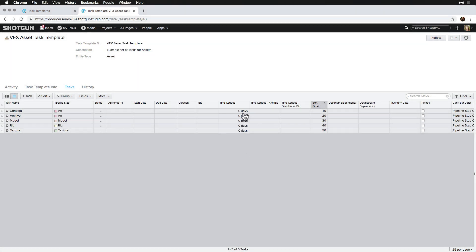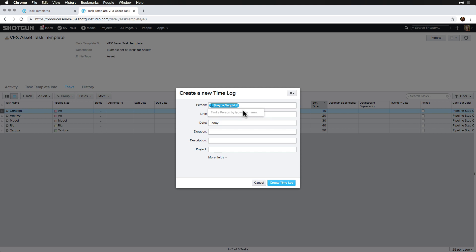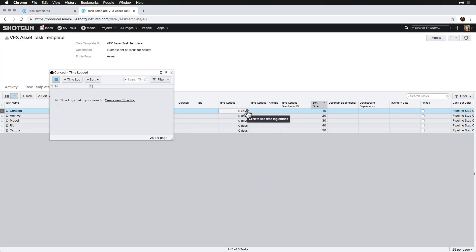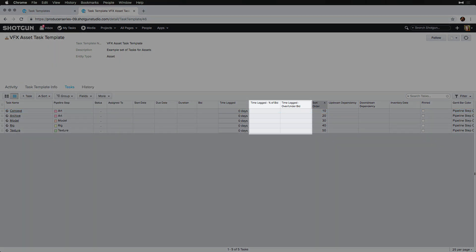Time logged will show me a sum of the time logged against that task, and it will also allow me to add time by clicking the plus icon while hovering over it, or see the time logs against each task by clicking the info button. The time logged percent of bid and the time logged over under bid will show me calculations based on the time logged against each of the bids. We'll cover this in more detail in the tracking bids against time logged topic.